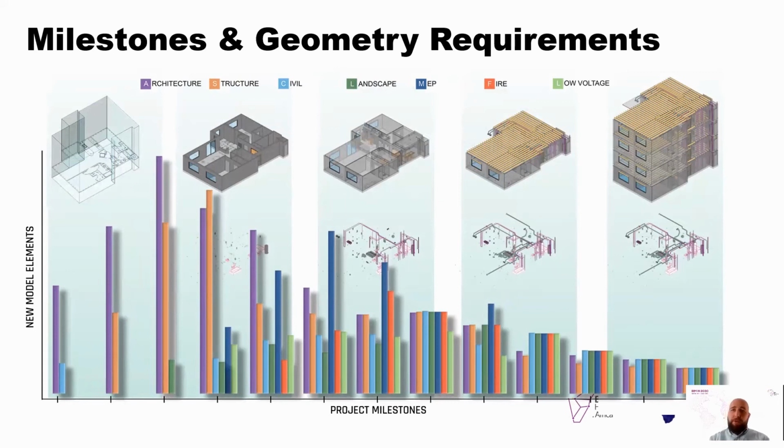So I know from day one, I'm not going to worry about all the piping systems because that's just halfway through the project. But what I need to know now is where my sanitary fittings will sit, where my HVAC units will sit within the ceiling, my lights, cable runs, major elements. And that allows us to define our project information more without having to look at everything everywhere.